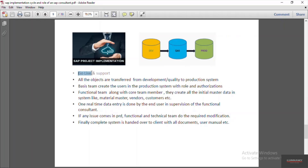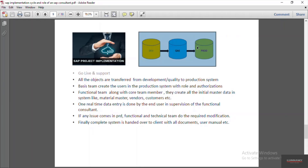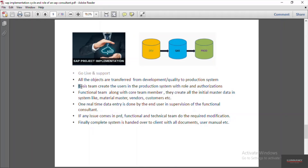In the go-live process, all development is generally done in the development server and testing is done in the quality system. In the go-live phase, all objects — whether in development or quality — need to be transferred to the production system. Once available in the production system, the client will be able to use it. The basis team also creates users in the production (PRD) system according to the roles and authorizations required by the client.